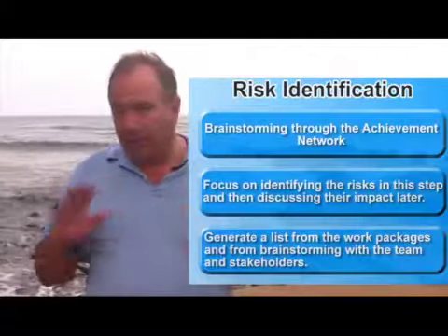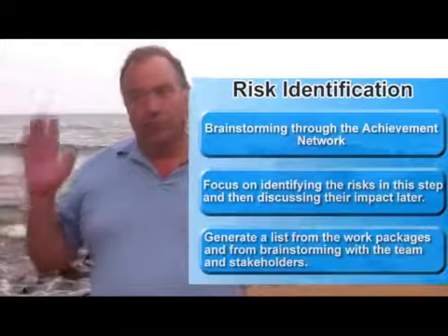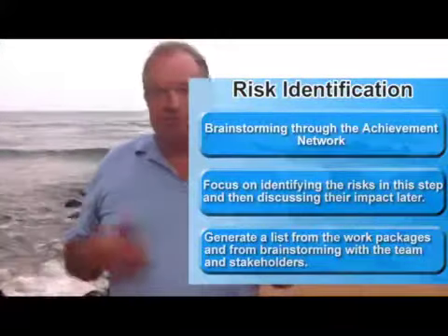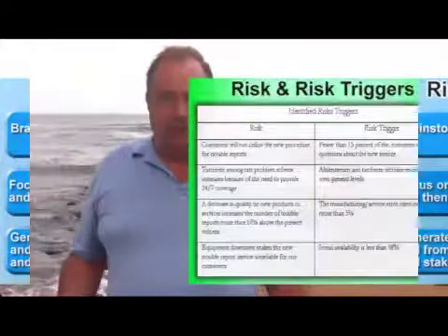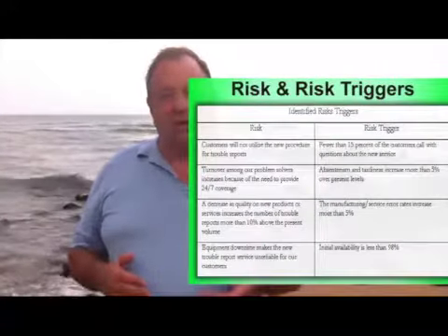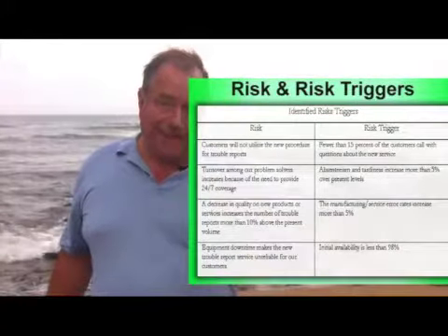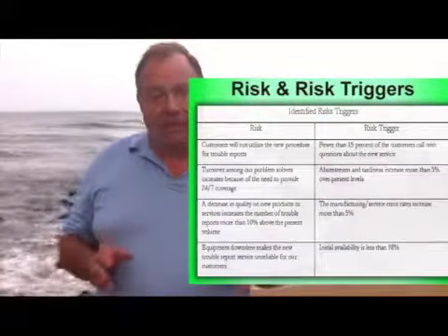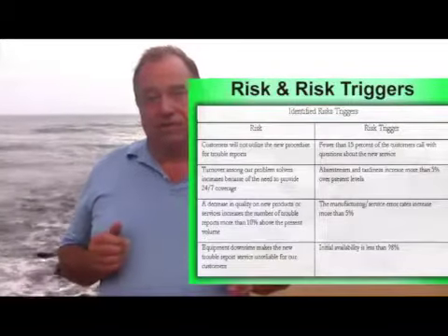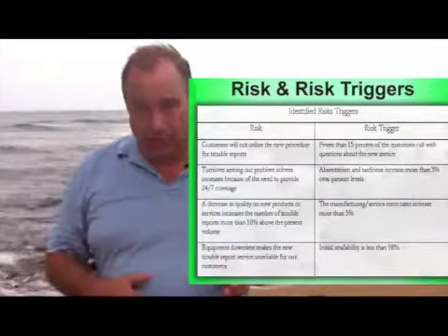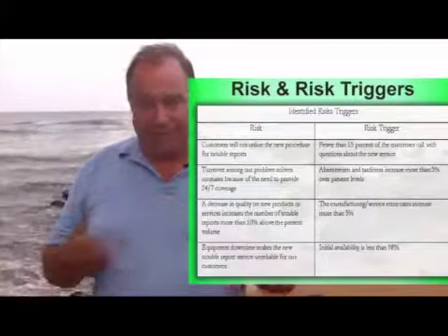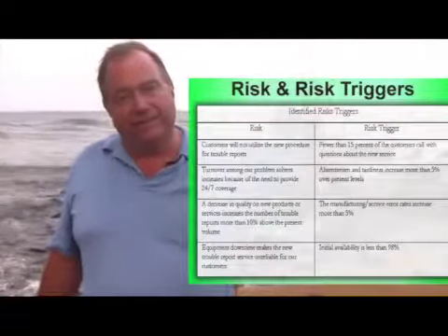We're not talking about what we can do about them. We don't want to try and judge the significance. We're just looking for a laundry list, 10 minutes worth on a small project, of the risks that we face. And remember, we're not only talking about bad things, but things that could happen, risk events that could cause this project to take a lot less work. We want to consider both sides of that coin and simply identify those items.